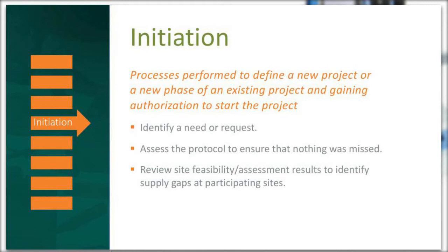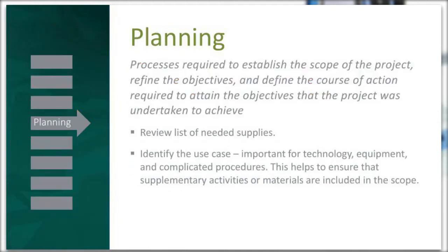Yeah, actually we did. We had a client that requested a specific refrigerated centrifuge, and it was vetted. Everybody was happy with it. It got to the site, and of course, it took up too much square footage for the site. Now, it was a desktop model, but their desktops were cluttered, and honestly, they just didn't have the room for it. So it needed to be then returned, of course, back to us. And this is a costly process to have this done. And then we had to go out and basically vet another ancillary piece of equipment or centrifuge for them to use at the site.